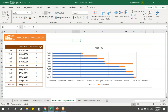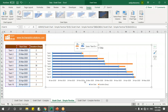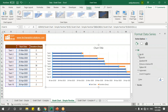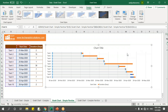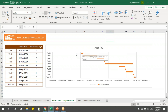Next, I don't want the shading for the start date series. I'll select it, right-click, go to Format Data Series, and under Fill say No Fill. You can see now the chart is starting from somewhere, so I need to remove that gap.